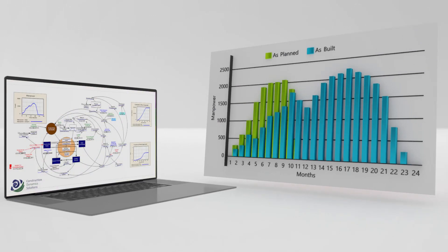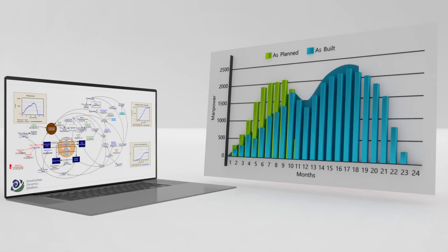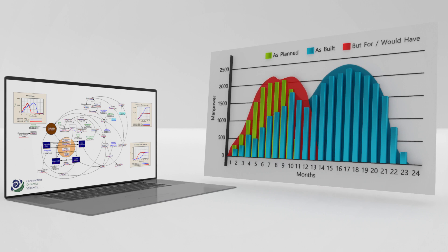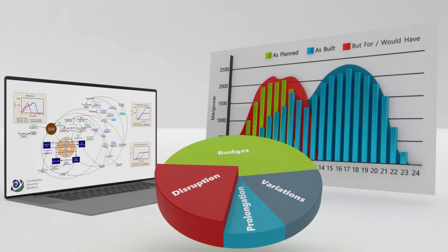How does it work? The model starts by reproducing the actual as-built performance of your project. But it then does much more. By simply removing the disruptive events caused by the employer, the model also shows how things would have turned out but for these events — in other words, what would have happened if these disruptive events had never occurred. So, System Dynamics accurately and defensibly determines how much disruption was caused by the employer, unmistakably linking his actions to the disruption that they and they alone caused on your project.